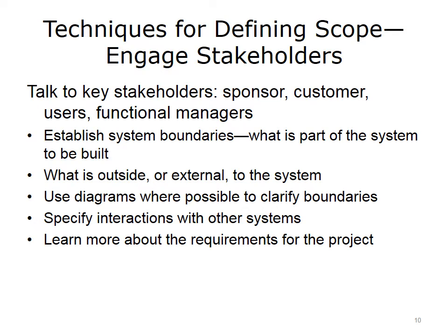You'll want to get signed approval for these agreed-upon interfaces and place them under configuration control so there is a very visible record of the relationship between your services, processes, and systems that you are developing for your project and the other systems and entities that are outside your project. In this way, these interfaces won't be modified without explicit consideration and approval.